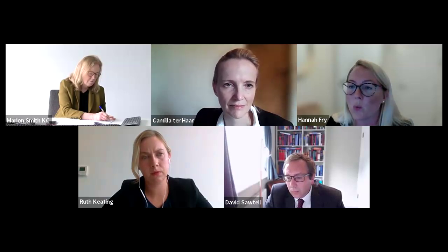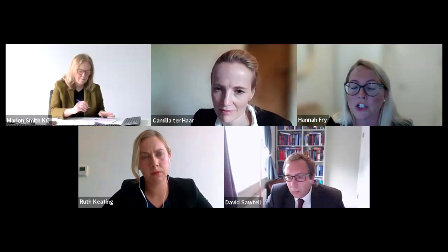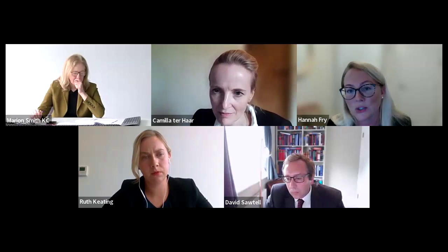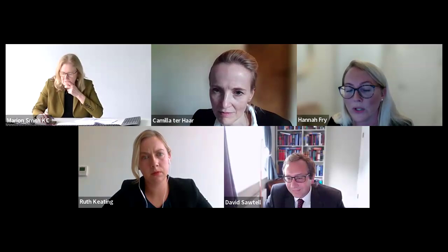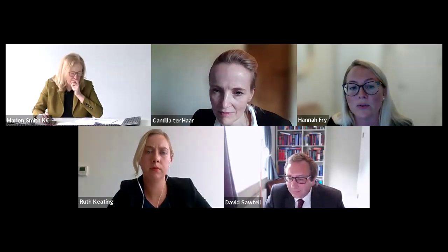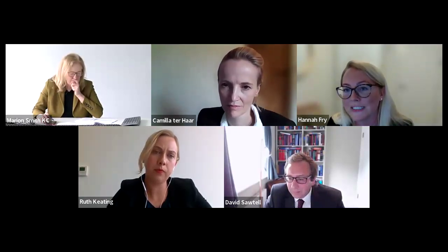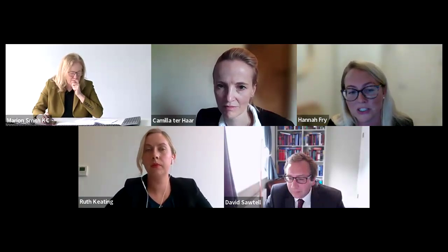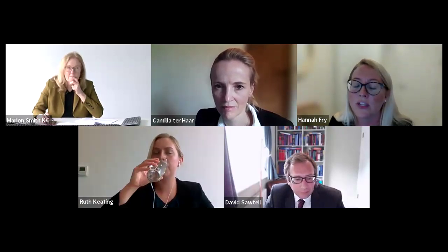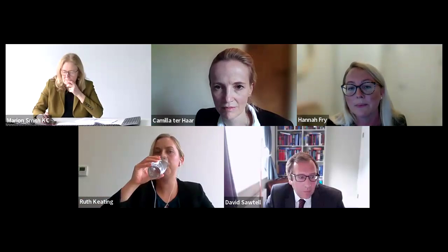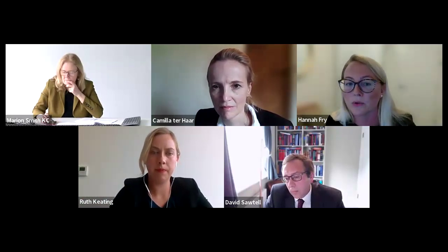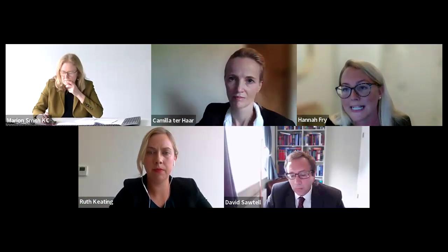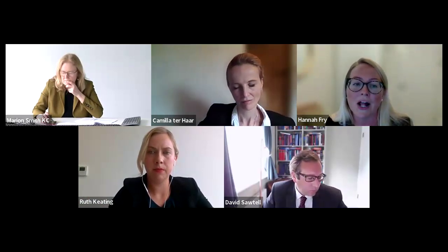So clause 8.1 of the 2024 edition now expressly includes these new 2 insolvency procedures under 8.1.4.3 and 8.1.4.4 and has addressed the lacuna created by this new legislation. So therefore, the employer has a contractual right to terminate for insolvency if the contractor enters into a Part A1 moratorium or a Part 26A restructuring plan.